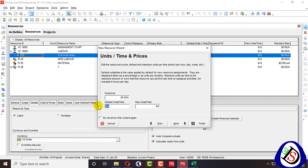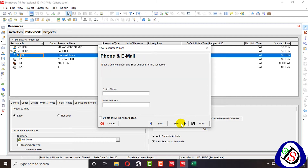I click next to price per unit. If you know the price per unit of this resource, you can add it. For default units, the minimum is one — because there should be one team of civil work, but there could be two, three, or four teams in a construction project. Maximum units per time may be eight teams. I will set maximum to two teams per time. I can also write an office number and email address.